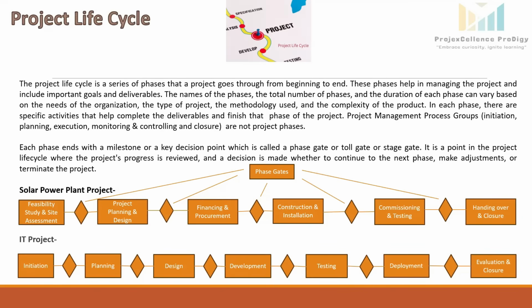And the final phase is handing over and closing of the project. The deliverables will be the project report, final documentation, final financial report, warranty agreements, and the client training. And the phase gate assessment will be done for the documentation and formal acceptance from the client for the project handover, and lessons learned for future projects.